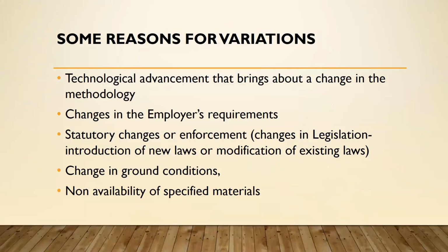There are some possible reasons for variations, just to mention a few. One is a technological advancement that brings about a change in the methodology. I remember a project where the contractor made a proposal of using the Tarami retaining wall instead of the traditional in-situ retaining wall.